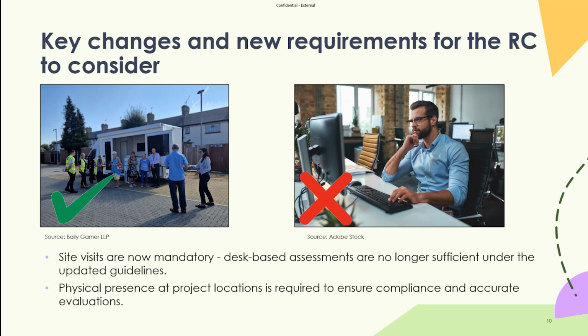So if they are a member of MCIB, RICS, an architect, they could undertake that role. So it could mean that a coordinator is overseeing a project as a whole and then relying on other individuals to undertake quality inspections. They obviously can't palm it off, so to speak, but they can work collaboratively with other people to ensure that quality is ingrained through the installation.